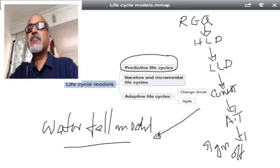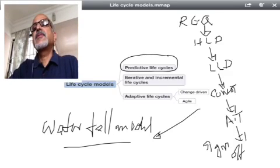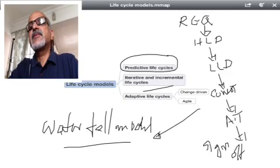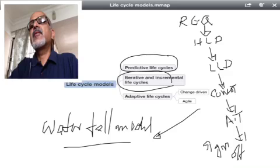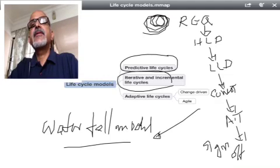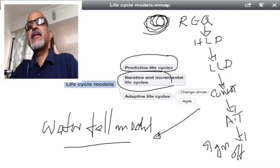Then comes the iterative and incremental styles where requirement itself can be repeated multiple times. Iteration 1, iteration 2, iteration 3 because after iteration 1, customer will have more clarity and then he or she may give more requirements or more clarity into the requirements.